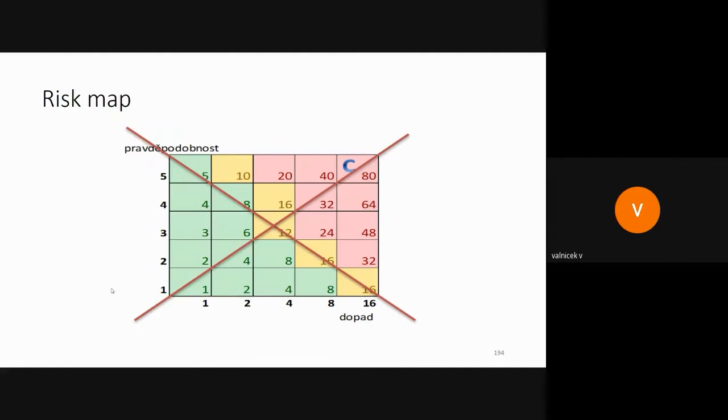And the only way you can do within the acceptance of the risks is that you will prepare the budget to cover the losses. You can do nothing with the risk, so you have to be prepared that you will pay all the losses by yourself.